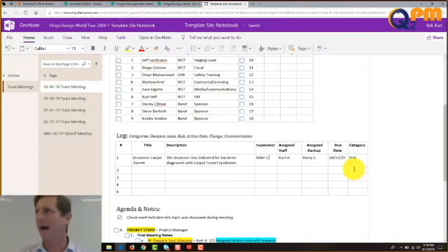Okay, so now, after the meeting is done, I go back to my desk, and what do I do as a good project manager with this information? You put it in the risk log. Yeah, I formally log it. It's not enough to leave it just sitting right here. I'll forget about it, right? Do two things. One, I'm going to record it in the formal log, and then the second thing, I'm going to add it to the project story. That's right, add it to the story. Put it in the log, add it to the story, in that order.